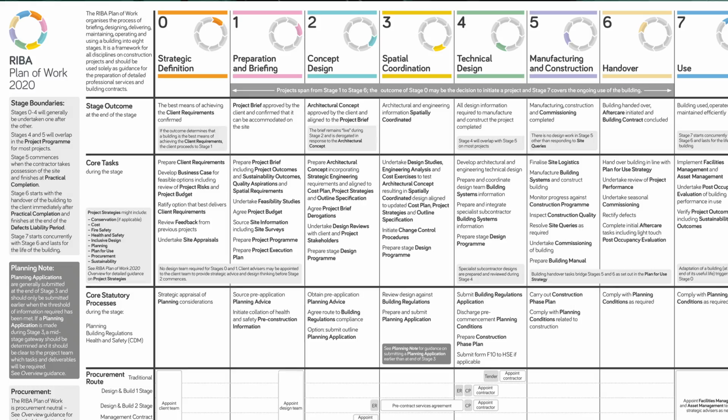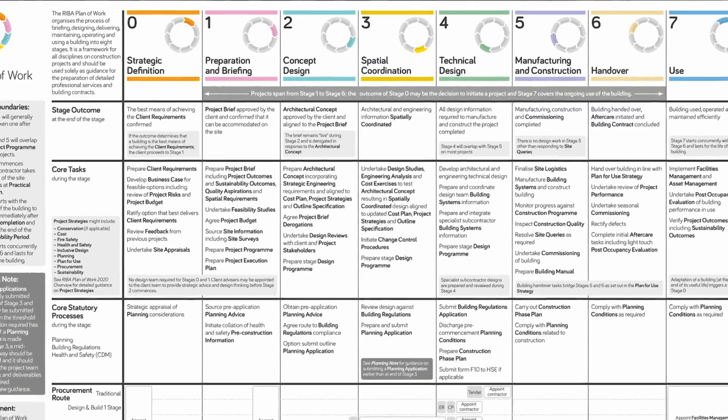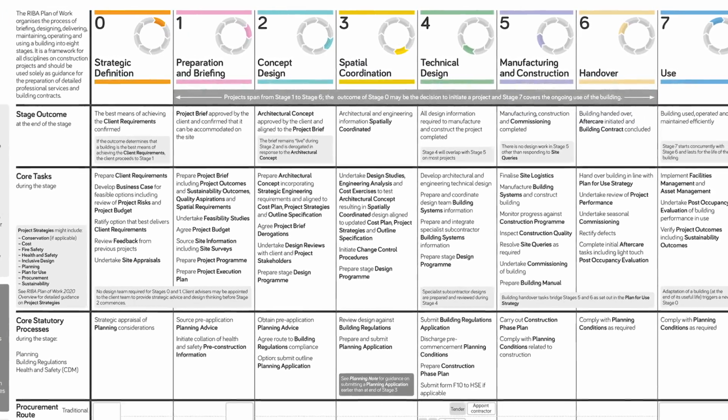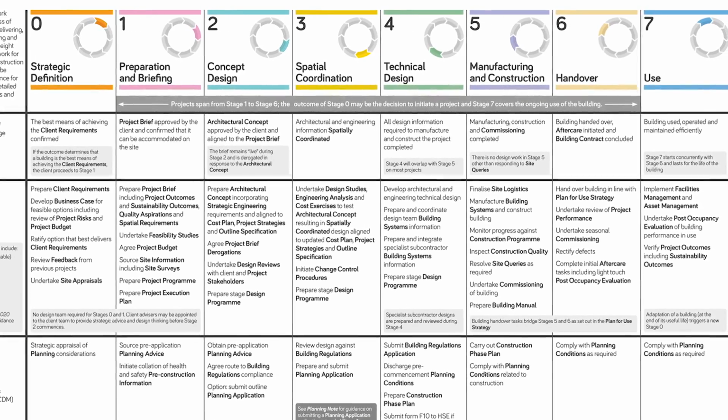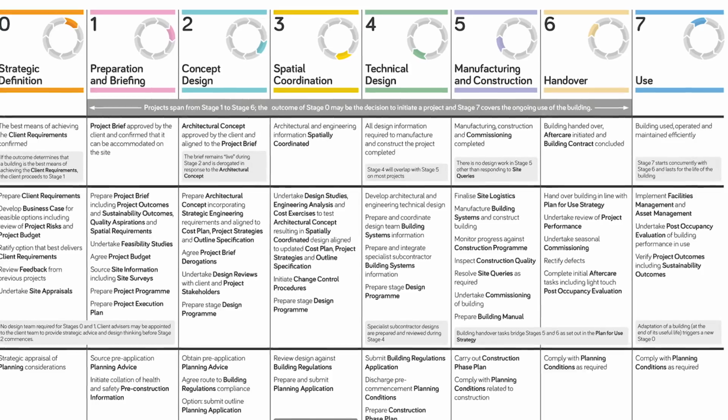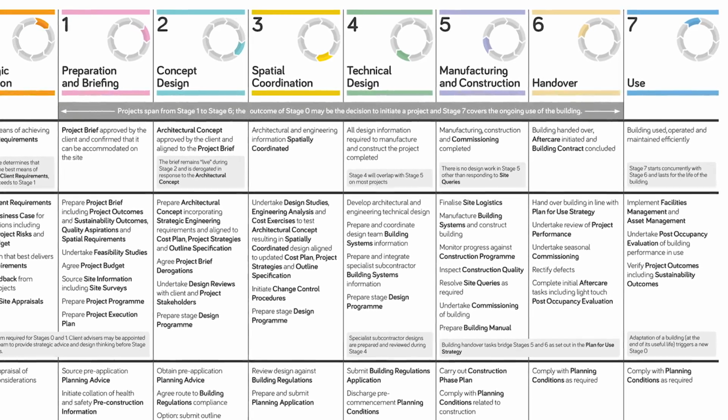So the RIBA, as you probably know, I'm talking about UK projects now. So not talking about French or Italian projects. For the RIBA plan of works, we have 7 stages, 1 and 2 roughly related to briefing or concept design, 3 develop design, 4 technical design, 5 works on site, 6 handover and completion, and 7 is in use data.